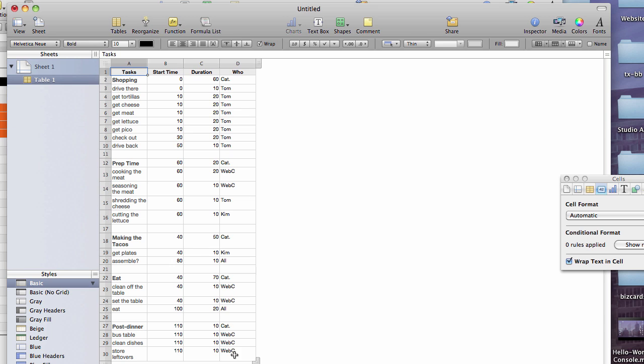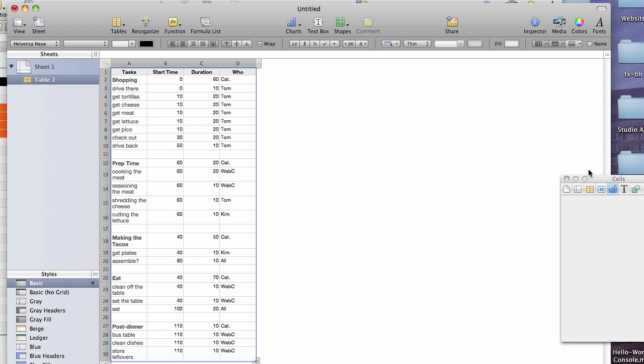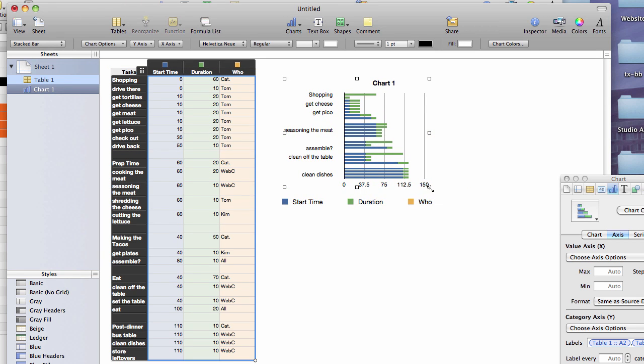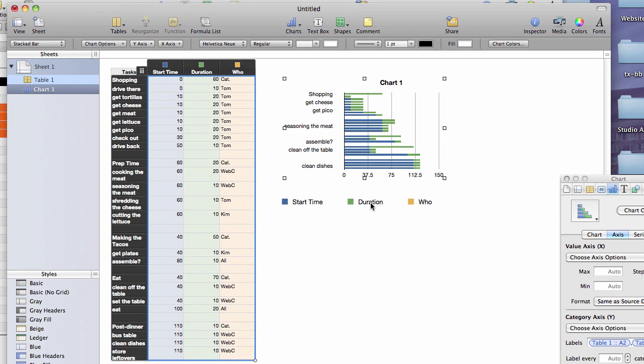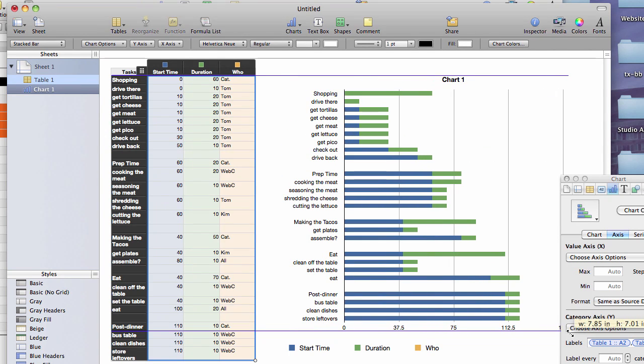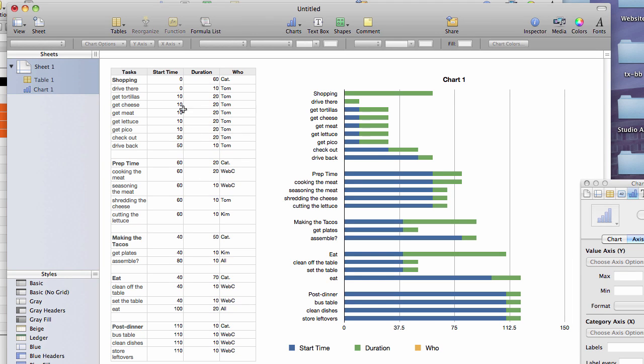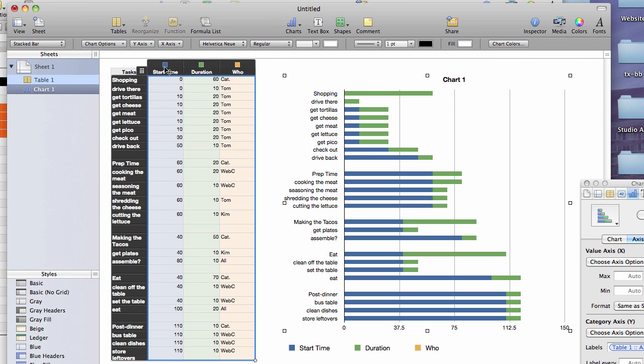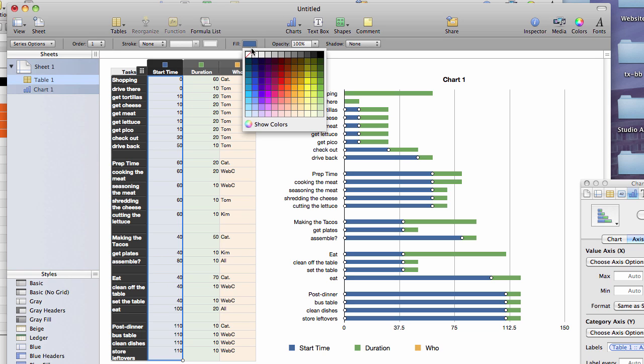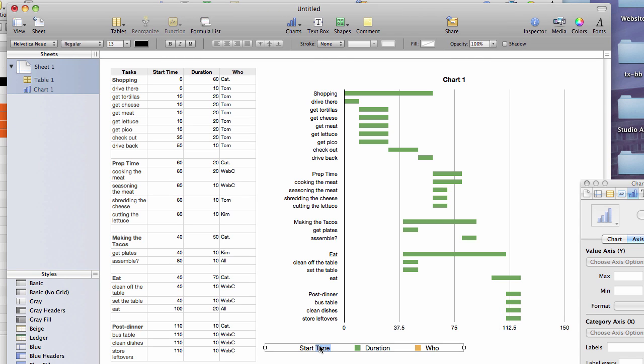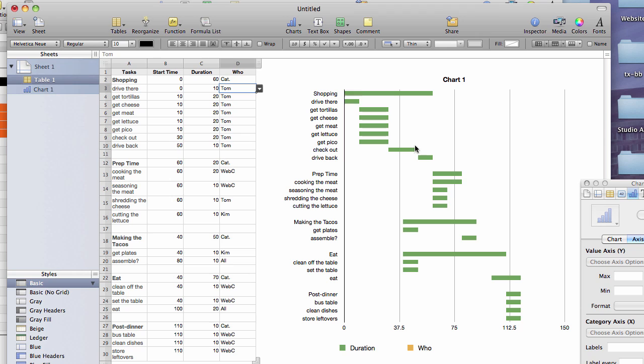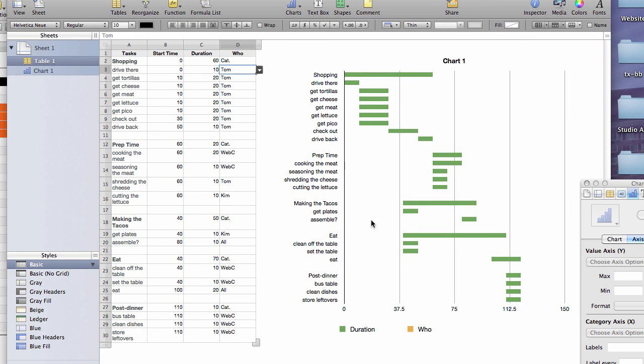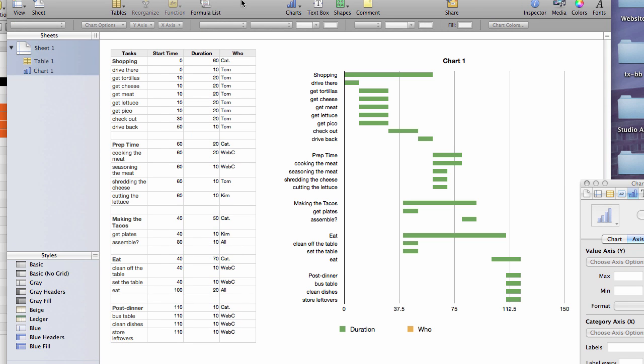Now what I can do with this is I can highlight the whole thing. And I can make a chart. This is the one that I want. It will be the one that looks the most like a Gantt chart. So you can see it here. It's not quite right yet. But bear with me and we will make it look more the way you're expecting. So currently we have start time and we have all this blue in the way. That's not really what we want. What we want to do is we want to click on the chart. Then click the column. So we have just this column selected. We want to change the fill to nothing. So now that's much more what you're expecting. And we can actually go ahead and delete this label out too if we want to. Now who doesn't really show up in here. Not with the way that we did this. If we want it to be color coordinated the way that this was we actually have to do it a different way. And it's a bit more complex. So I'll show you that real fast too.